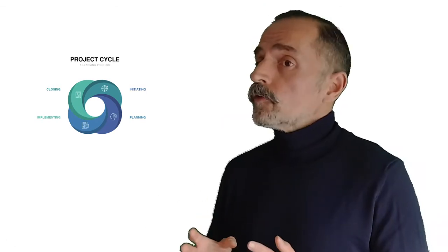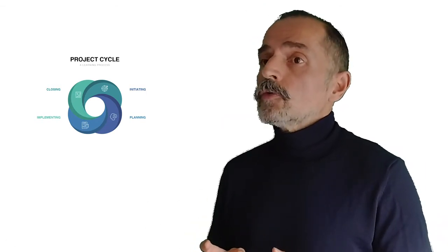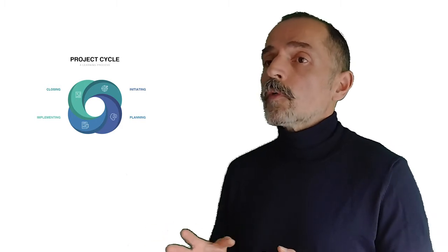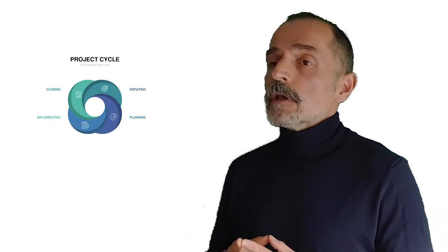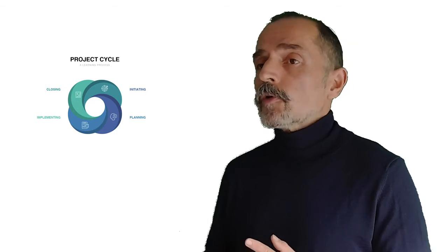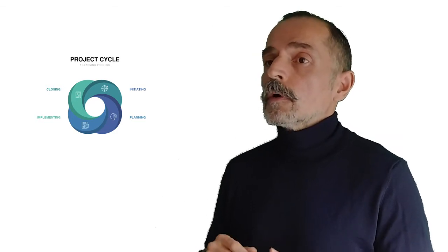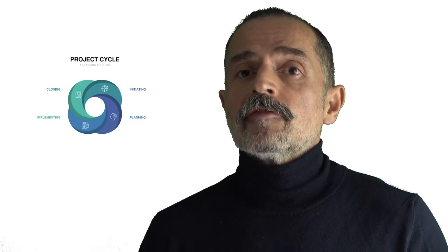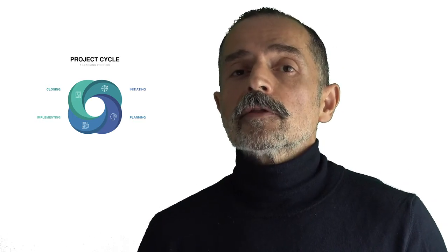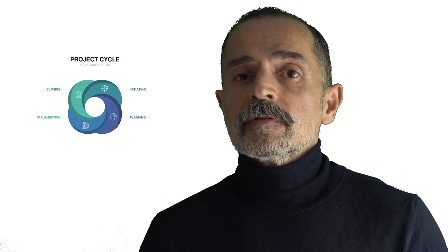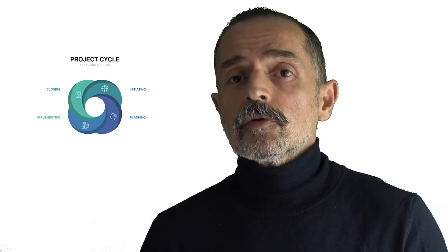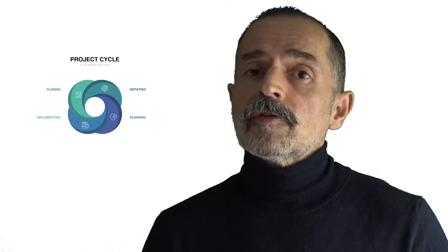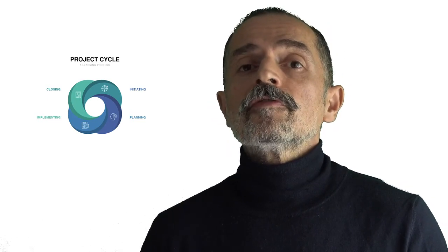During the closing phase, it's also important to make sure that you do the administrative and financial closure of all relevant obligations in your project. Close all procurements, close all contracts. Make sure that all payments have been done and that you've collected all the pieces that will eventually be necessary to invoice your sponsor. And the closing phase is also the moment to produce the final report.